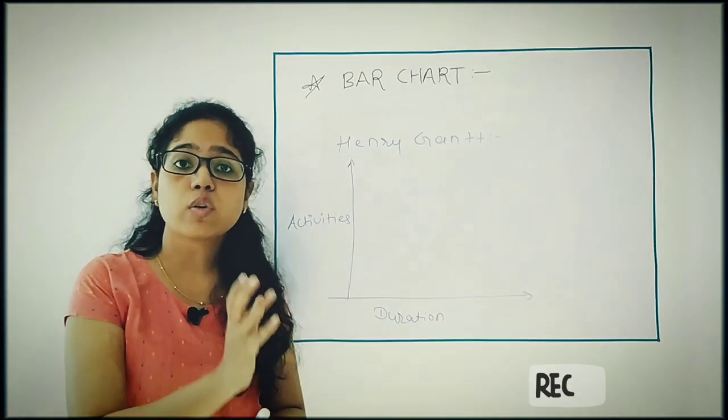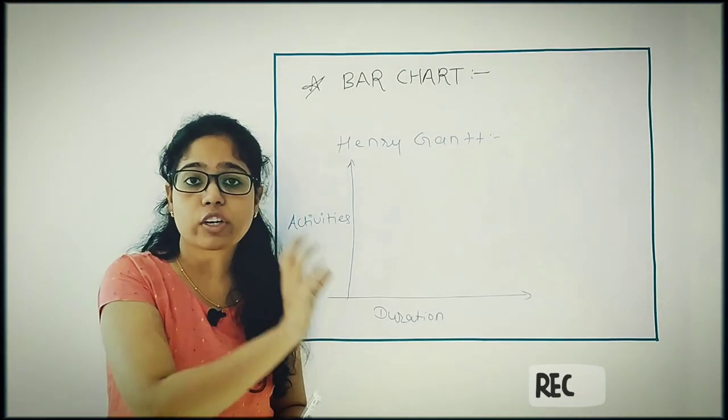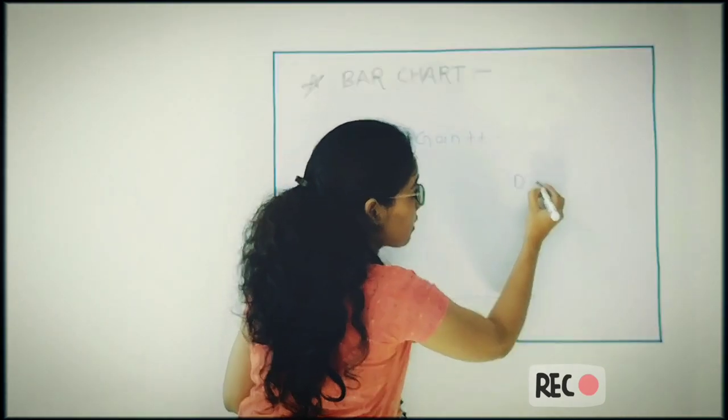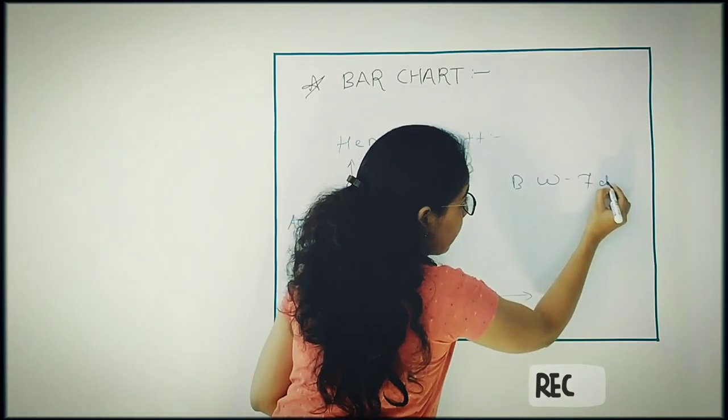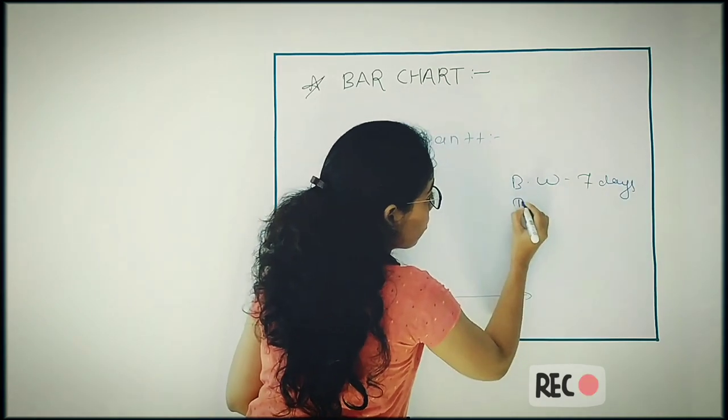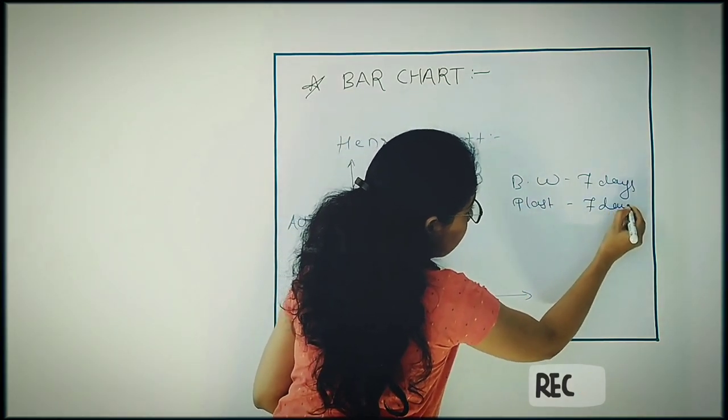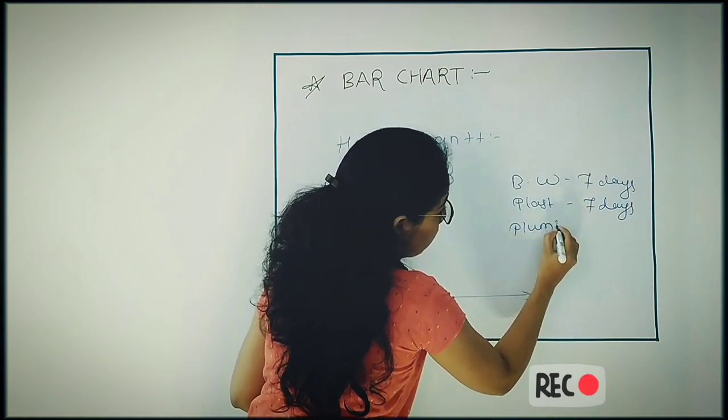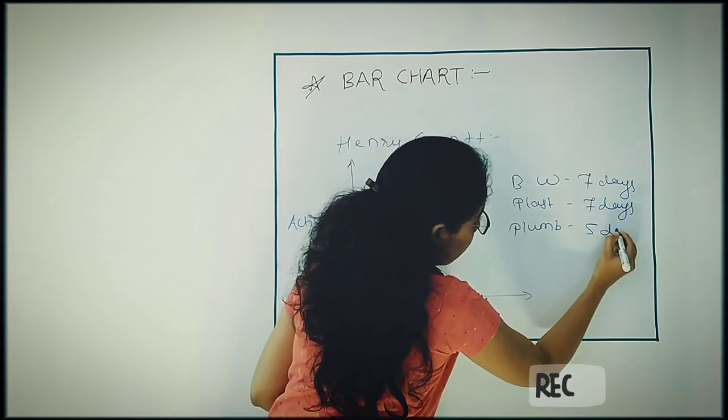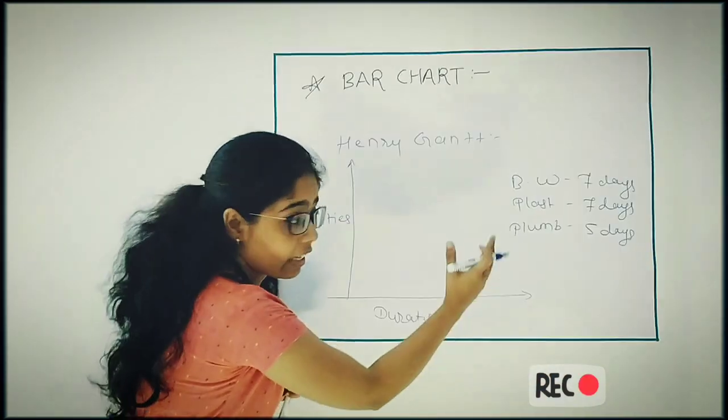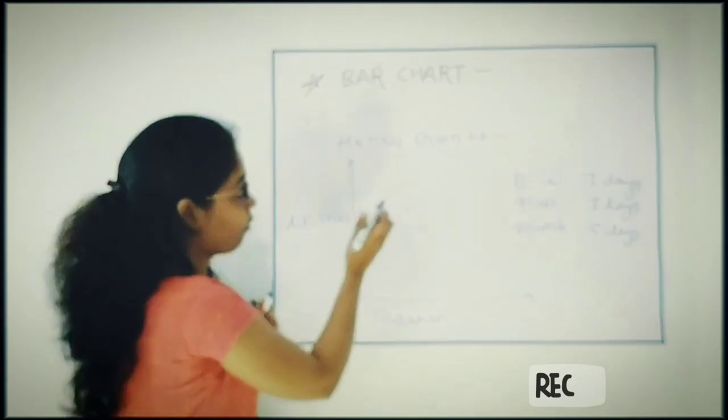In a bar chart, you have to start the first activity at the top. And also you should know what is the duration required for each activity. Suppose brick work is having duration of seven days, then plastering again seven days, then plumbing five days, and likewise. This much data you should have.